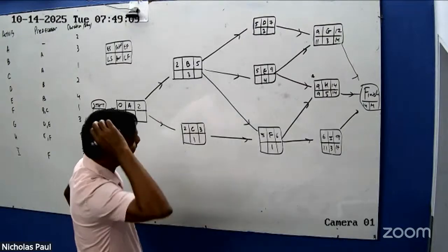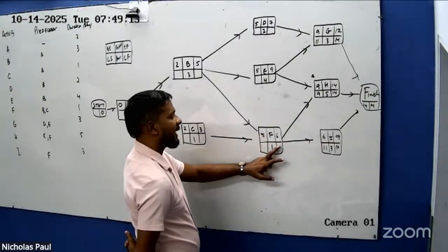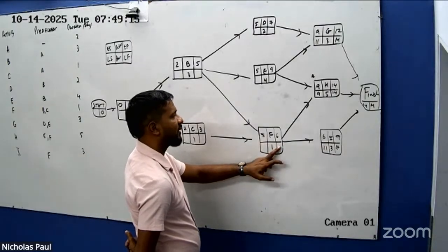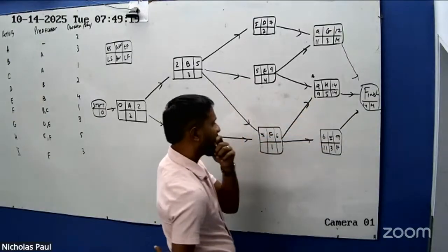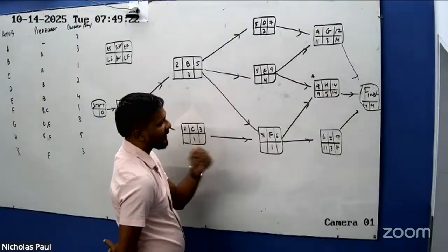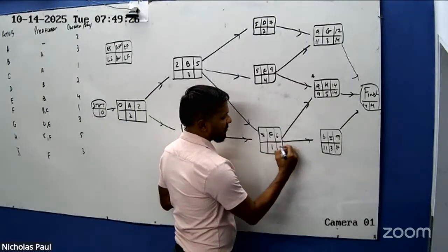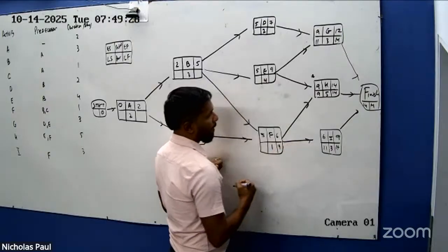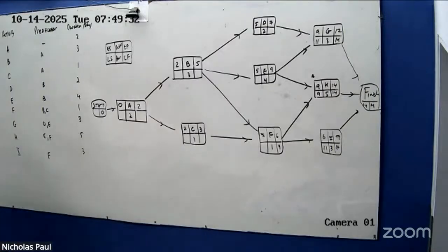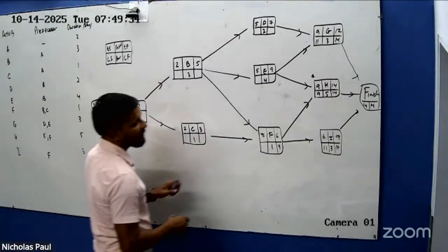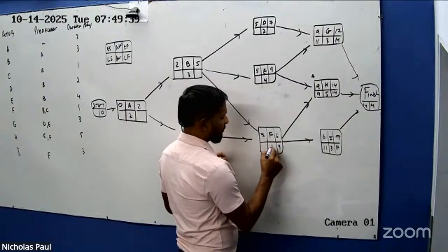Right? F is a little bit tricky because the latest I could start F has to be dependent on these two numbers here, 9 and 11. So what I'm seeing here is that the latest I could finish is 9. Right? The latest that I could finish there is 9 because if I choose 11 days, 9 minus 1 is 8.